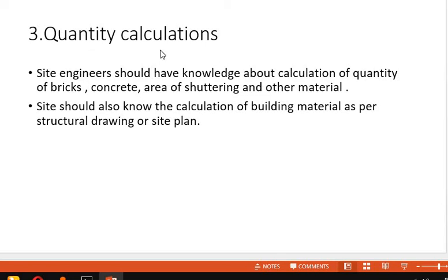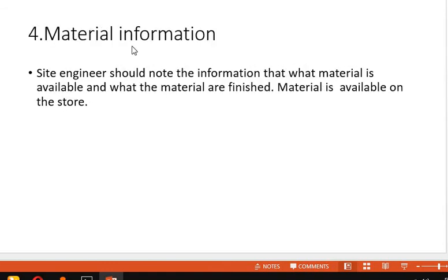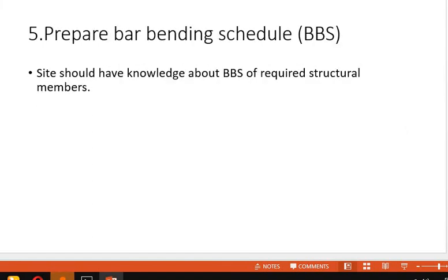According to the site plan and structural drawing, you have to specify what amount of materials are required, and the estimation will also be calculated from the quantity calculation. The next thing is material information. A site engineer should note what materials are available and what materials are finished, so that you can order or purchase from the market, ensuring there are no shortages when work starts.